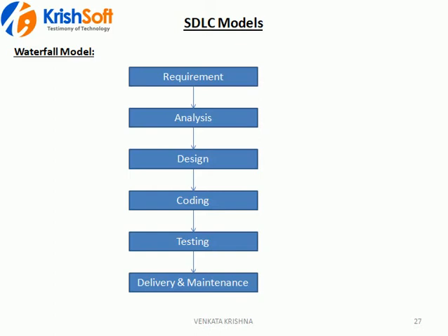Coming to the analysis phase, we are going to analyze those requirements. We all discuss those requirements. If something is not clear, we go back to the client and ask for clarifications. Team building activity, feasibility study activity, preparing the understanding documents and giving the reverse KT to the clients, all these things happen in the analysis phase. In the design phase, the architects start designing how we are going to implement the entire application. They will use UML, Unified Modeling Language, to design those flowcharts and all. So they start the designing activities.